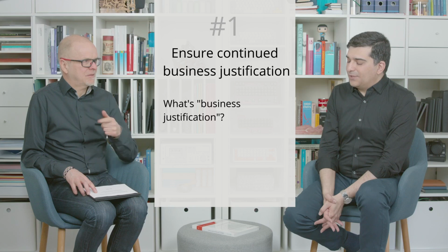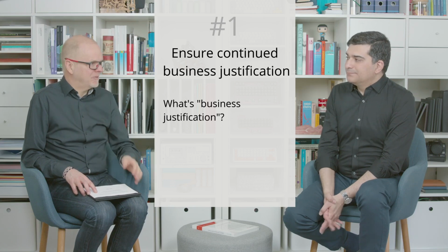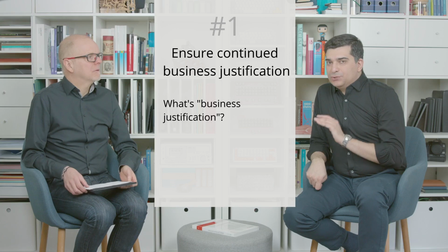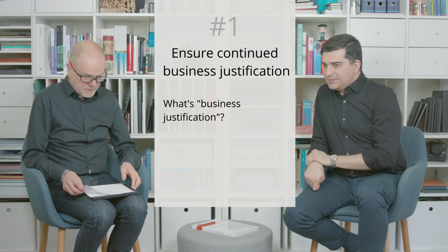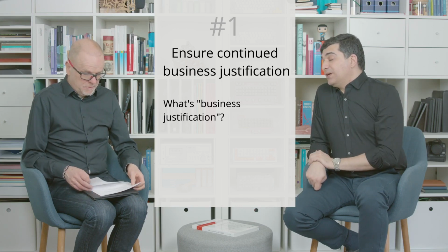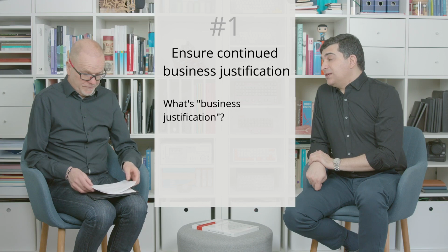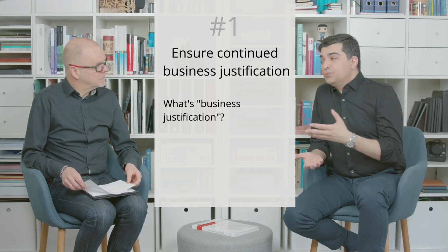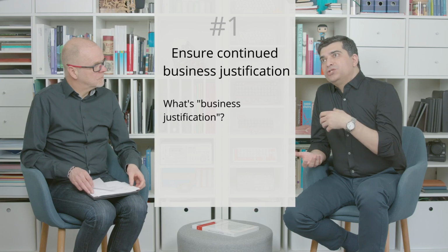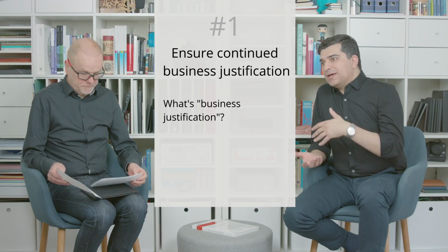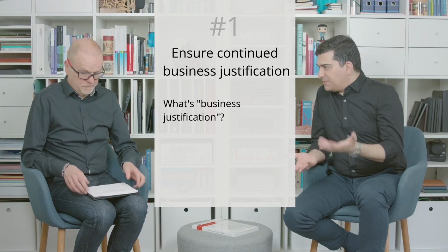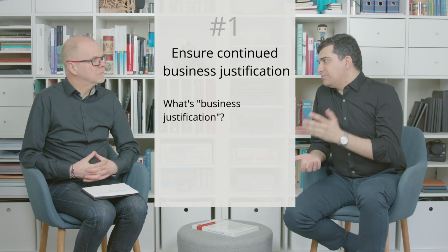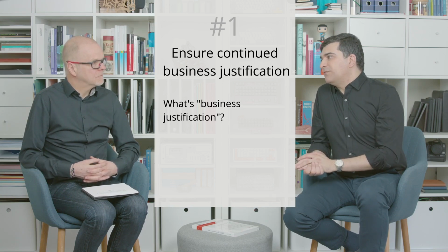We are checking to see, does the project still have business justification? Yes. At the end of each stage, we do it when we update the plans. And there's also managed by exception that has to do with business justification. So if there's an issue or anything that changes the variables above the threshold, we will update everything, and that includes the benefits, and ask the project board whether or not we have to continue.